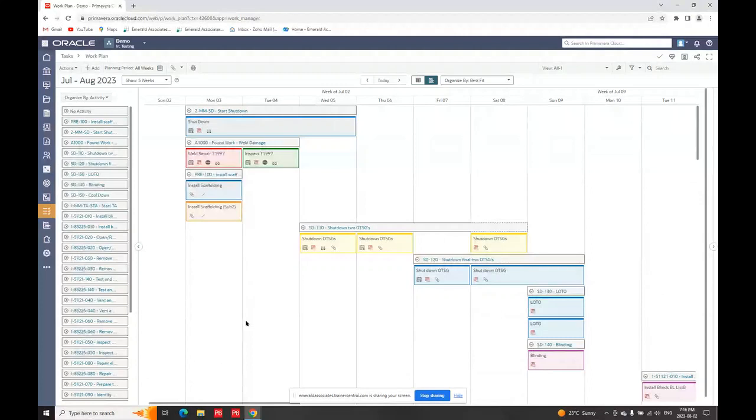but there is some interesting functionality in here that you may find does help with managing your projects, because as Nicole was saying, you've usually got your schedule, and then you need to coordinate that with the people in the field. Well, just because I've got an activity in my schedule, for example, I've got one here that says install scaffolding, you'll notice I've got 2 tasks under it. Well, the reason I've got 2 tasks there is 2 different areas are involved in that install scaffolding activity, and they're being handled by 2 different companies.